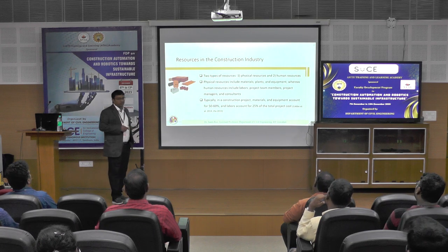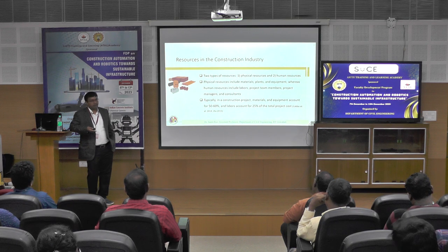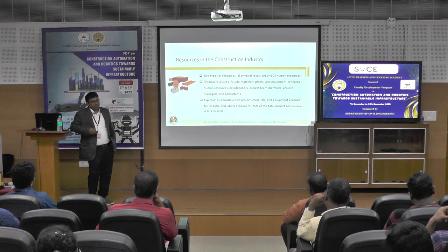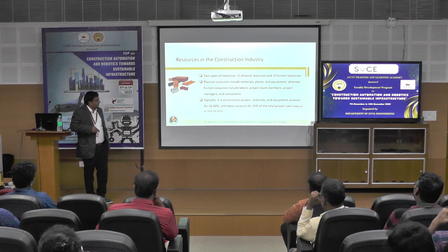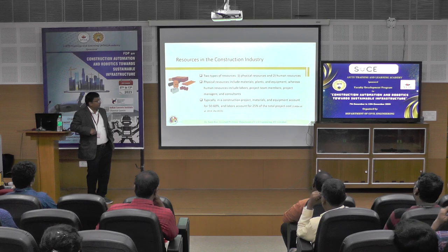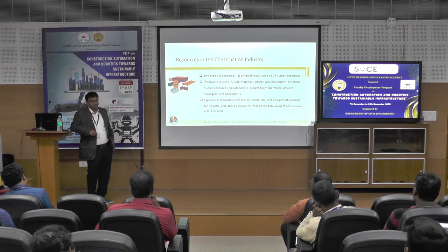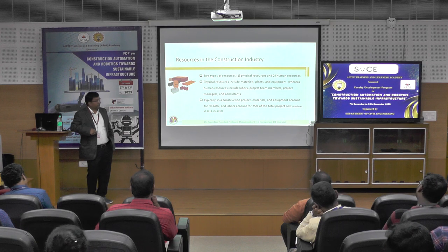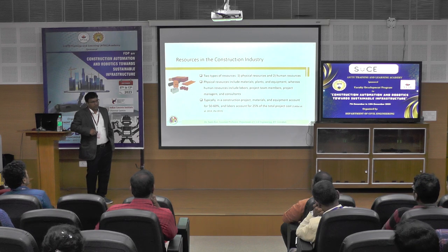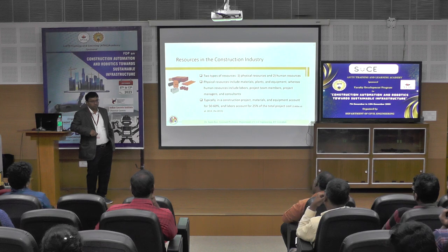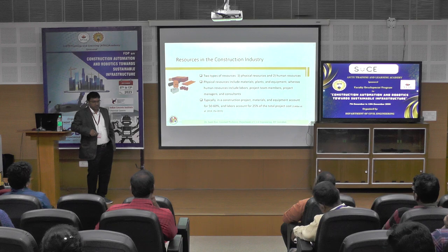There are two types of resources: physical resources, which include materials, plant, and equipment, and human resources, which include labor, project team members, project managers, and consultants. Typically in a construction project, materials and equipment account for 50 to 60 percent of total project cost, while labor accounts for 25 percent. Therefore, material management and labor management are two crucial aspects for optimized acquisition in the construction industry.